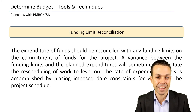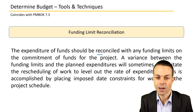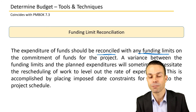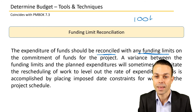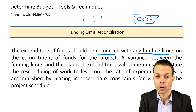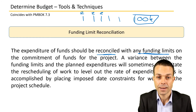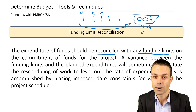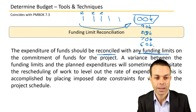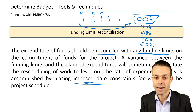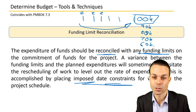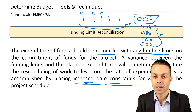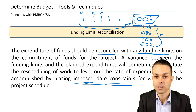Funding limit reconciliation means the expenditure of funds should be reconciled with any funding limits on the commitment of funds for the project. For example, if we have a hundred thousand dollars total and we're spending money at each phase, iteration, or milestone, that needs to be reconciled against the total budget. This is accomplished by placing imposed date constraints like milestones into the project schedule, tracking the amount spent and subtracting it from the total budget so we always know where we stand.